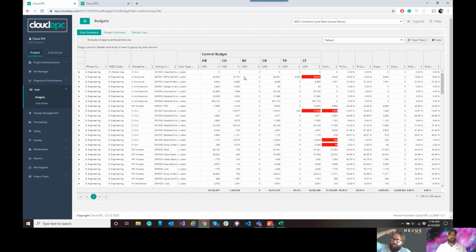or the actual change order with all the backups that live on that object in the change management module that took us from a $10 project to a $20 project, along with all the trends as well. So, using the example of pipe, the extra 10 foot of pipe that we found after design was complete. From there, that logic gets repeated in the progress module, and we'll touch on it again, but that really completes what budgets are within Cloud EPC.